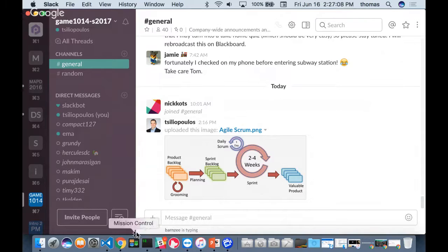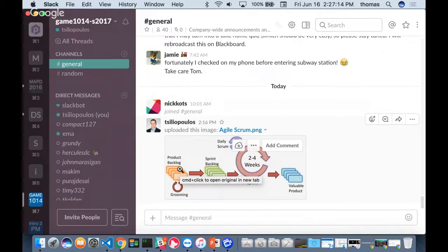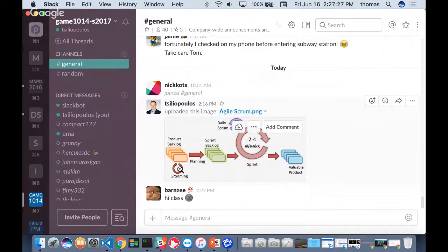Right here, right? The product backlog is where we put all of our user stories before we actually decide on any features. Now, you may not have started this way when you were doing your initial release, the first playable, right? But think about it going forward. I've got all these things that I want in my game. I've listed them in this product backlog, and I've weighted them with a number, 4 hours, 3 hours, an estimate. It doesn't have to be accurate, okay? Because we're not accurate. We try to be as accurate as possible.